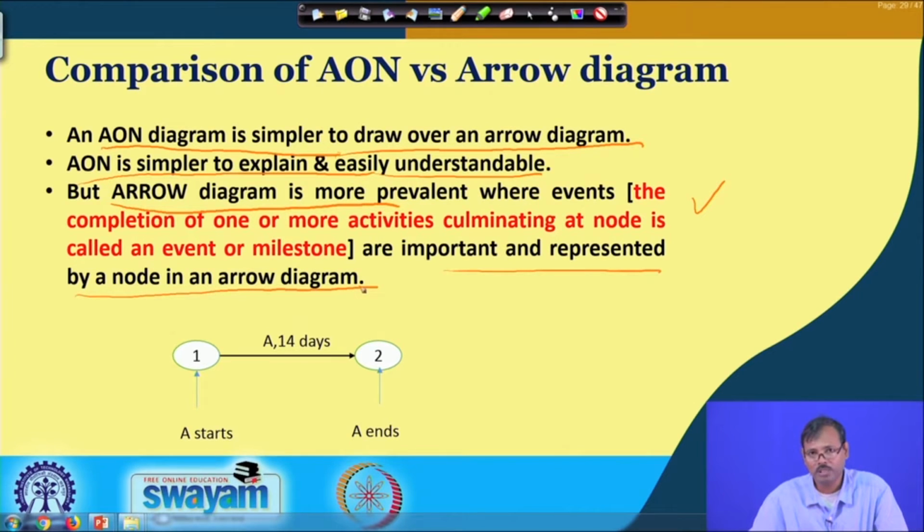The arrow diagram representation needs less memory, because it can be explained by an arrow of starting node and ending node. But for the activity on node diagram, the activity will be defined in the computerized system with its predecessors and successors.